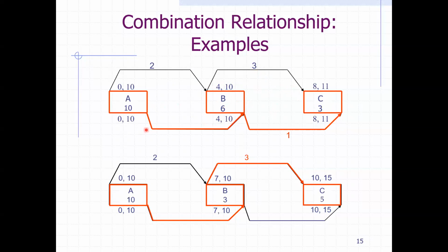But we're also enforcing the condition where B cannot finish until A finishes, and C cannot finish until B finishes. To make sure, we gave 1 day extra as a lag for C to complete. If you remember from the previous lectures, we don't want B and C, the bedding or the sub base and laying the pipe, to finish on the same day, because it's unrealistic, and you still need to give at least 1 day to make sure that everything per the specs is done.